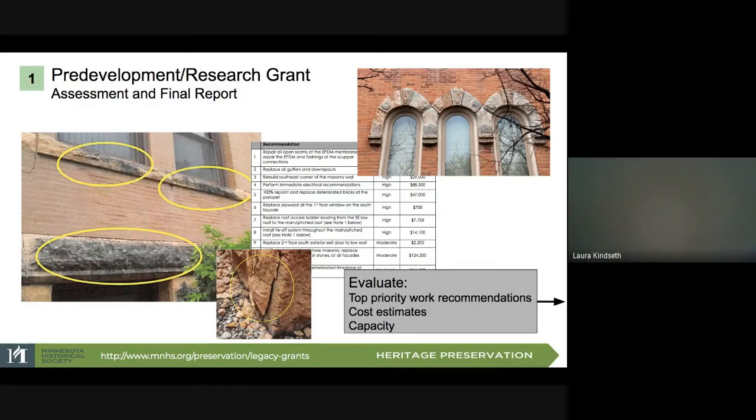First thing you need to do is discuss the plans for future building use with your architect, and this way it will help to determine the treatment approach according to the Secretary of Interior standards that will be applied to all future work at your building. And that is why this is so critical to have this step performed first.